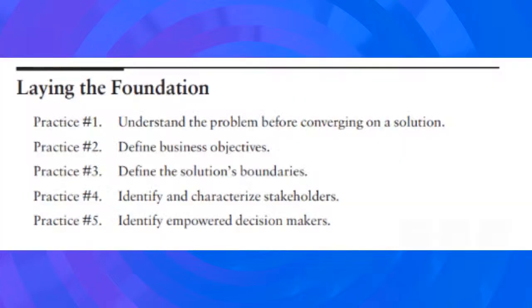And I think that probably answers the first major question that I had for you, which was, why is it important to really understand the challenge, right? I think you've already answered that question, because if you don't understand the challenge and you don't fully grasp what the true need is, there's a very high likelihood that you're going to get a barrage of change requests, follow-up questions, possibly some defects that are coming out of the entire software development process that you're going to have to fix anyway. And what can happen if you're not careful about laying this starting point of understanding the problem is you can build a solution for the wrong problem and experience project success, but product failure. So that's what we want to try to avoid.